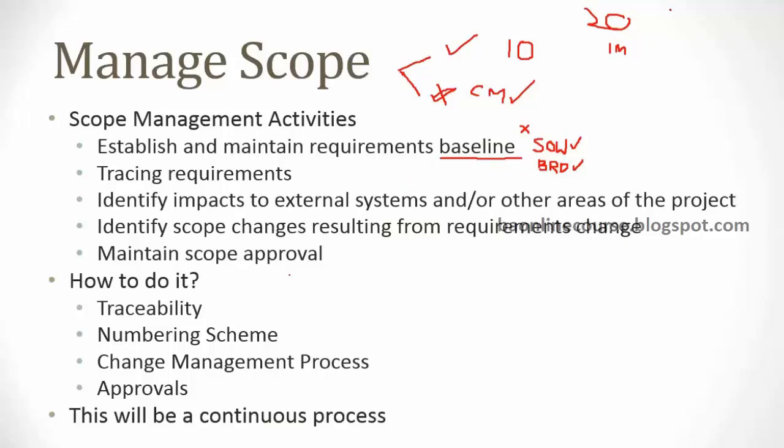Now, let's take the example, Citibank and Accenture are there, right? Now, Citibank is awarding the project to Accenture. Okay. Now, there needs to be a contractual document for this particular project. So that document is called a SOW. Now, in the SOW, what you will say is that, I would do all these things. Accenture would do all these things, and I would pay him this amount, and it would be delivered in these timelines. And these are the terms and conditions of the engagement. All that project-specific details are captured in the SOW.